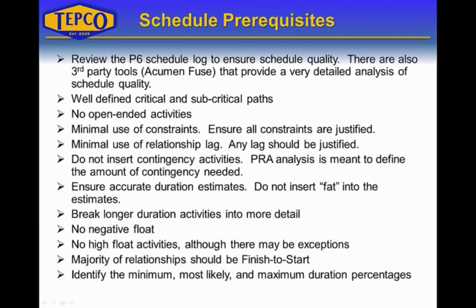A high quality schedule is required to run Primavera risk analysis. So you'll want to review your P6 schedule log to ensure schedule quality. There's also third-party tools like Acumen Fuse that work very well for this. Ensure you have well-defined critical and subcritical paths.